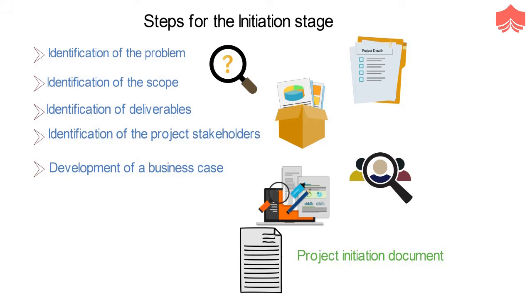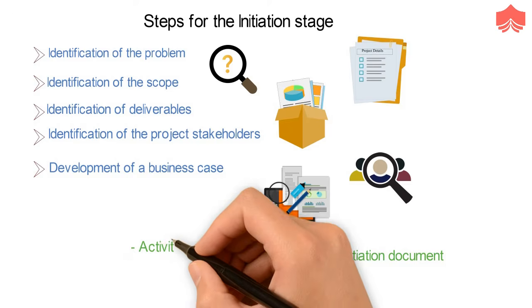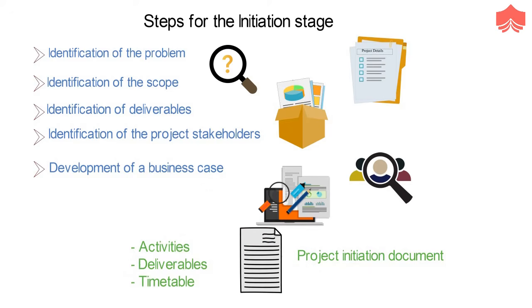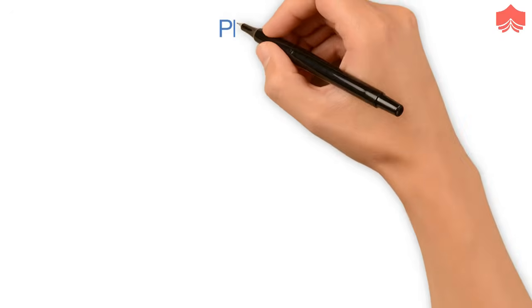The statement of work is the document that captures and defines all aspects of your project. You'll note the activities, deliverables, and the timetable for the project. It's an extremely detailed document as it will lay the groundwork for the project plan.